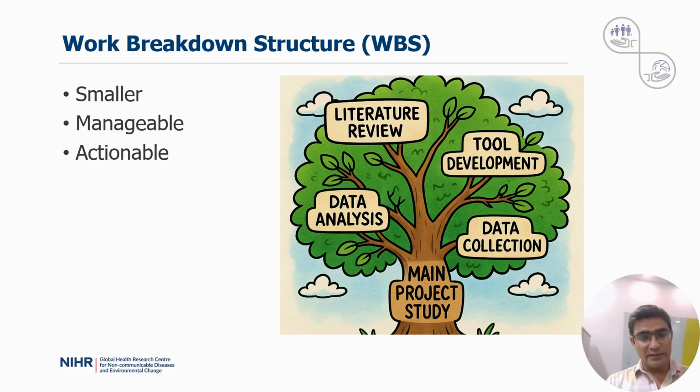First, we will discuss WBS, the work breakdown structure. As the name suggests, it is a tool used to break the project into smaller, manageable, and actionable tasks. So think of it as a tree. Your main study or project is the trunk, and each phase branches out into subtasks. For example, literature review, tool development, data collection, and data analysis. Further, you can divide these tasks into subtasks as leaves.